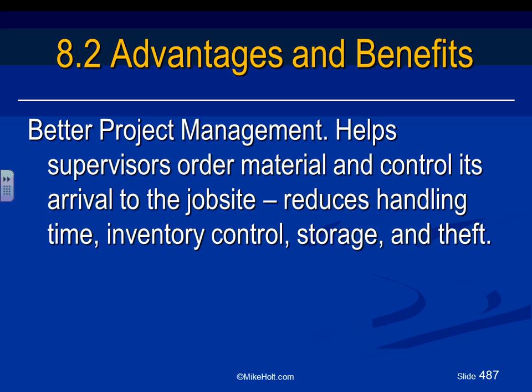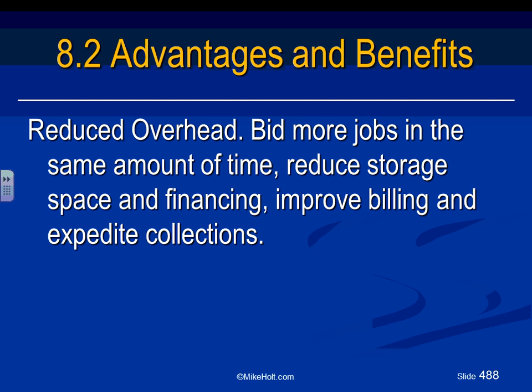When you guys print the report for your friend Chad, you're going to have tons and tons of reports for every stage. So you can assign what time I need all my EMT conduit to come to the job site, at what stage of the job. So you don't have to store and handle it and worry about theft and so forth.